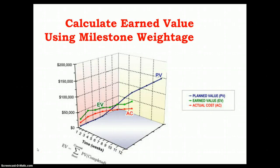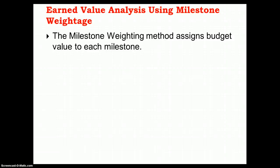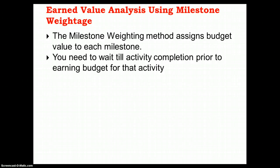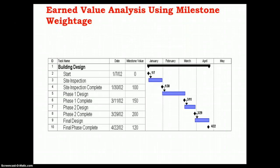In this quick tutorial we will analyze the method of calculating earned value using the milestone weightage method. The milestone weighting method assigns budget value to each milestone. You need to wait until activity completion prior to earning budget for that activity — you cannot claim any milestone credit for an activity which is still in progress. Careful consideration must be given in planning for milestones, which could correspond to key accounting periods.